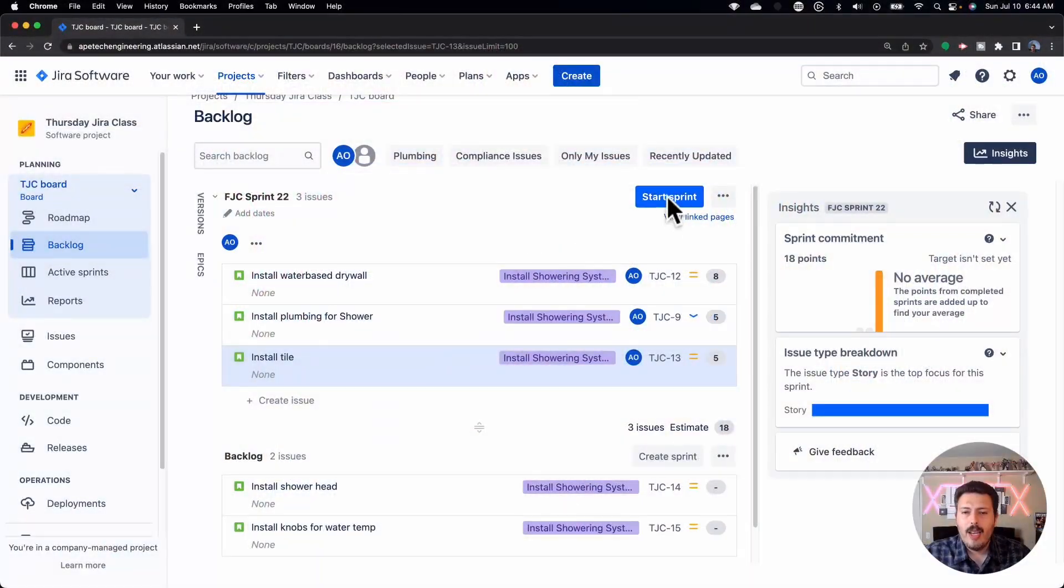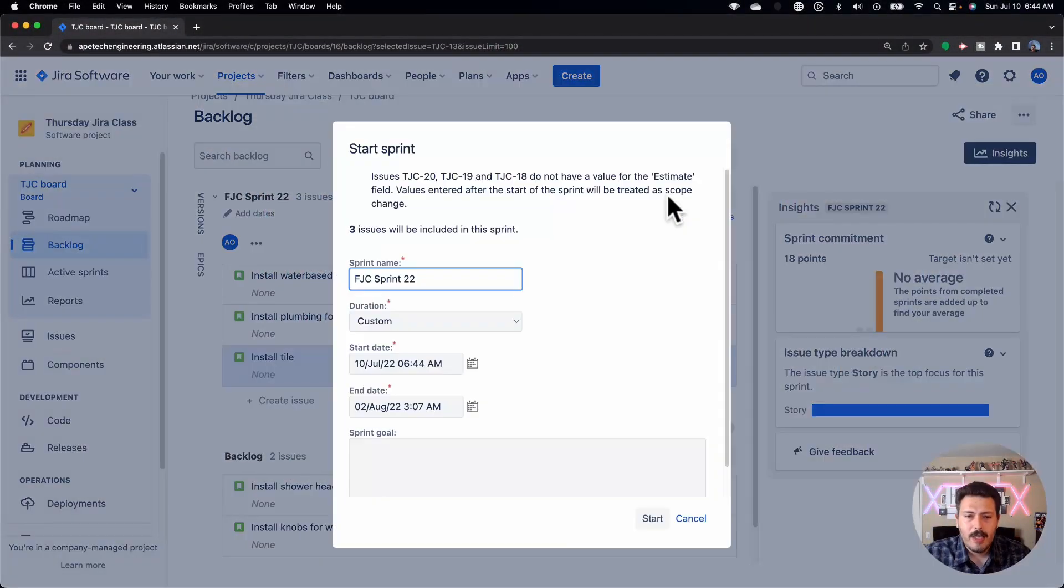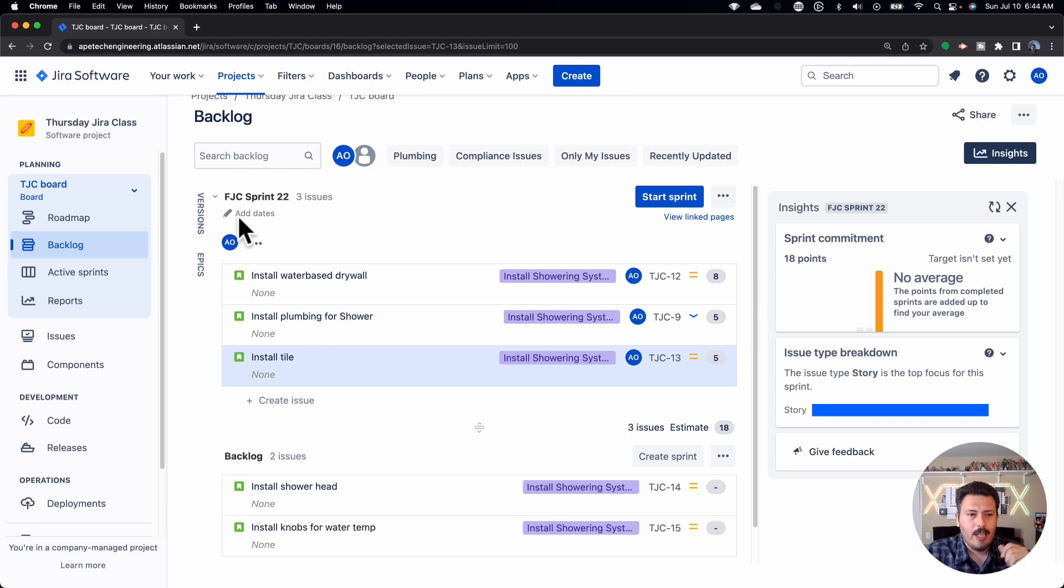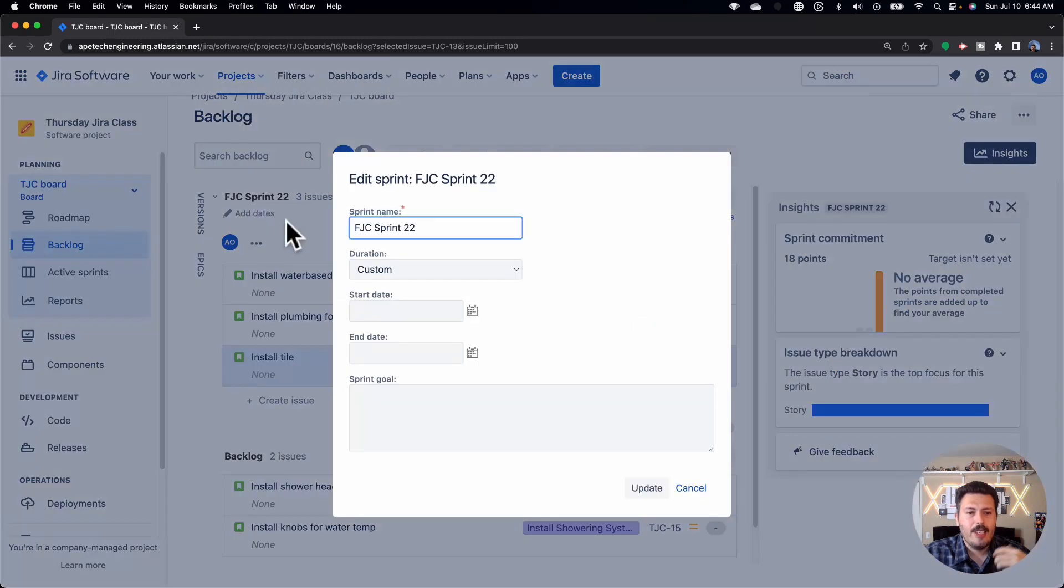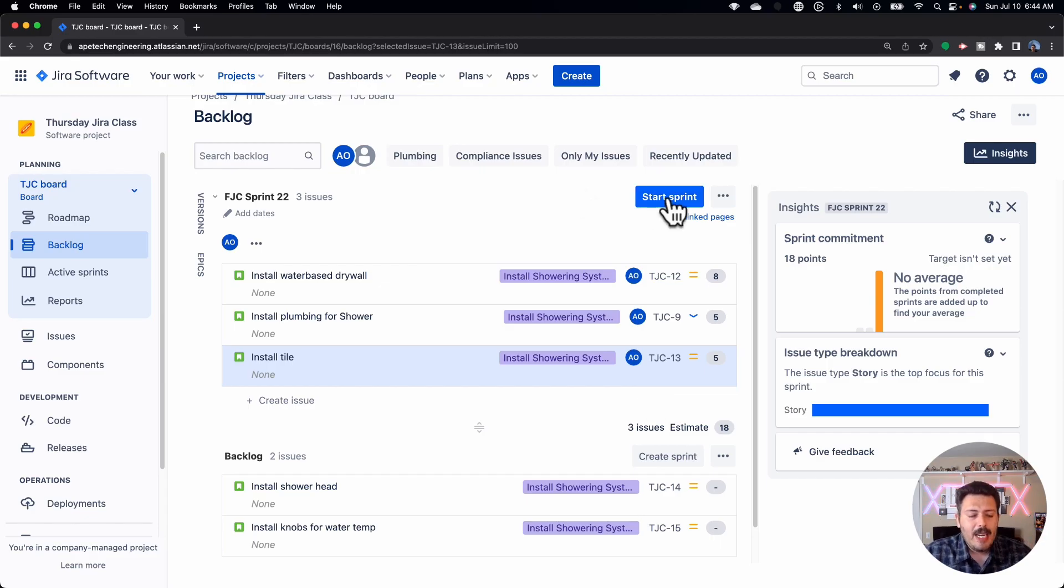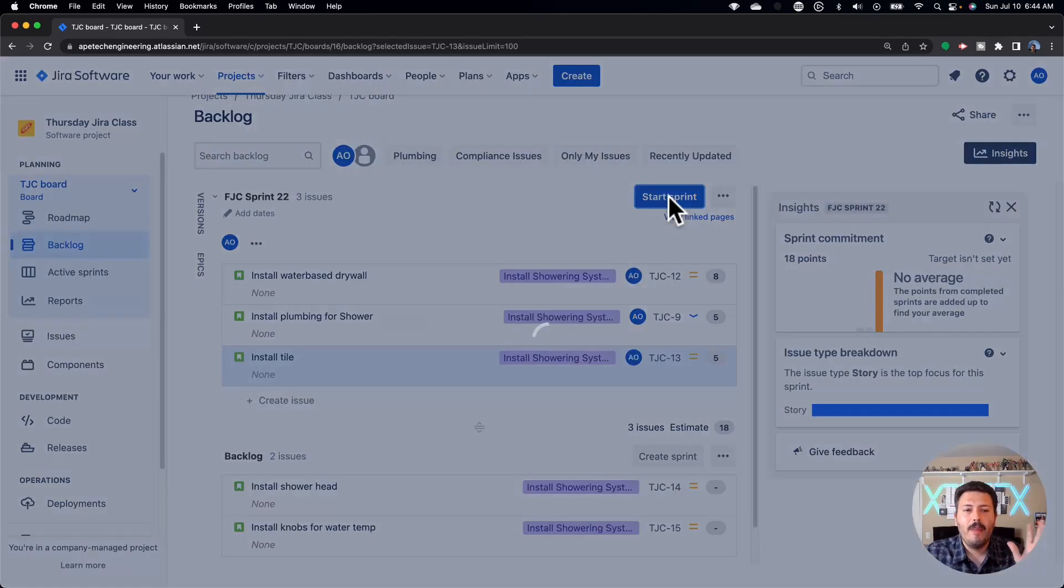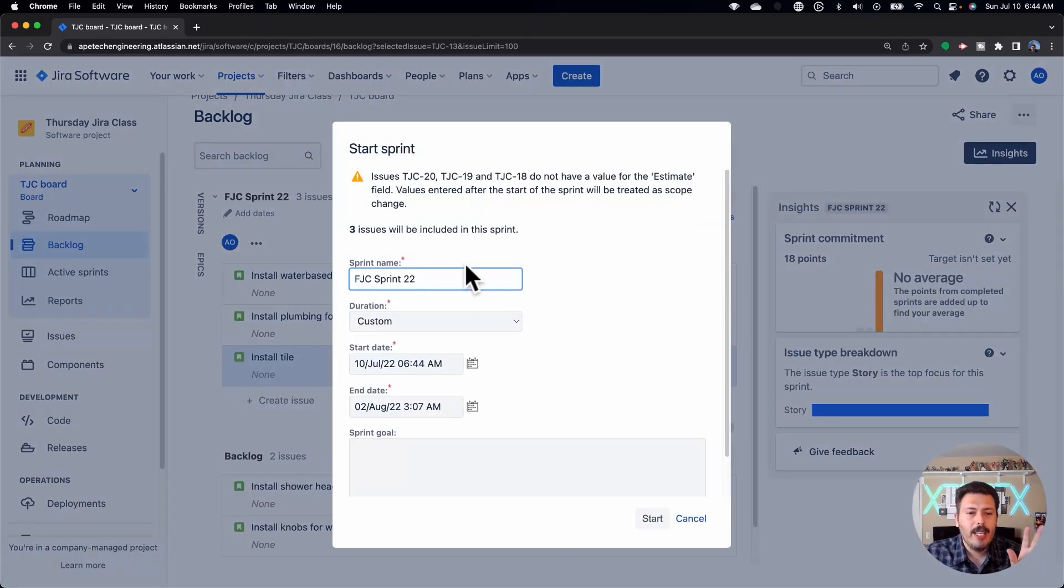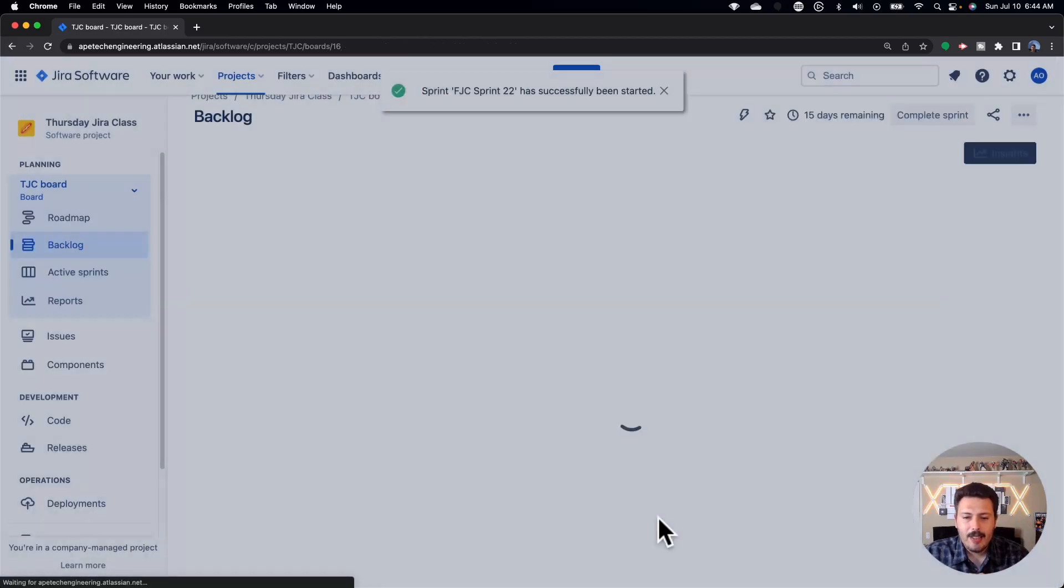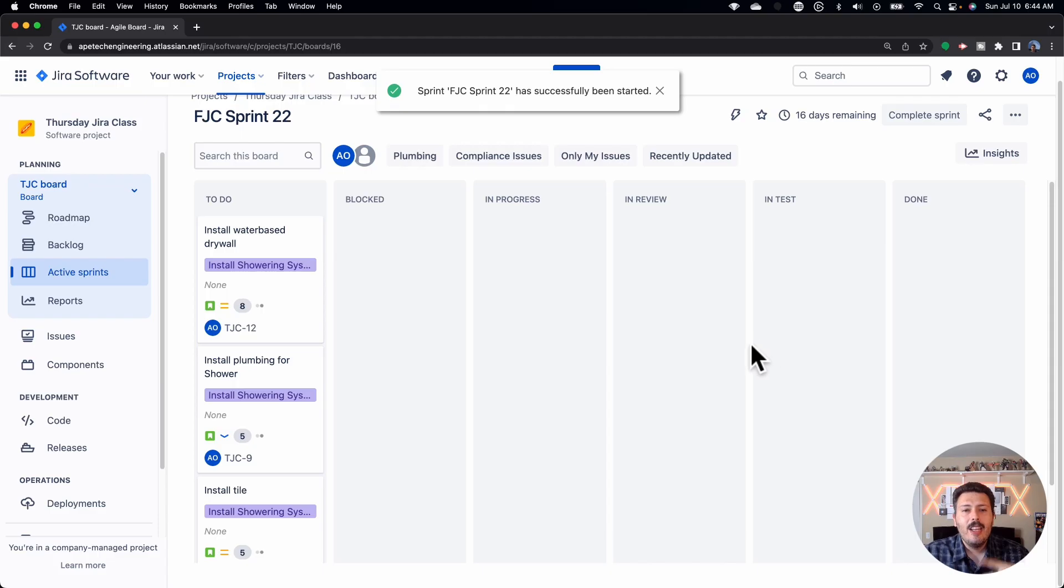That's pretty much it for what we're going to be doing in the backlog. Once you have all those T's crossed and your I's dotted here, you want to go ahead and start your sprint. You can actually come and do the goal before, and you can come in and put the dates before. All you've got to do is come into Jira, and you've got to come to the add dates section, and you'll see you get the same pop-up. But once you're ready, you can just come in here, put in the right dates, put in everything that you're going to do, hit that start sprint button, and then you're off to the races. So at this point, we're going to be transitioning to the next ceremony as a Scrum Master, and you're going to be using Jira to help you drive your daily Scrum.